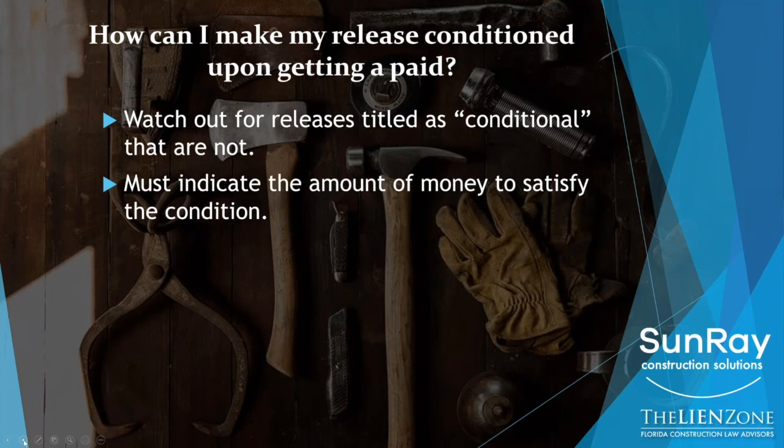You must also include the amount of money to satisfy the condition. So a $10 release that's conditional is conditional on $10. So if you're expecting a $30,000 check and it doesn't say that it's conditioned on $30,000, then it's not conditioned on your receipt of the $30,000.